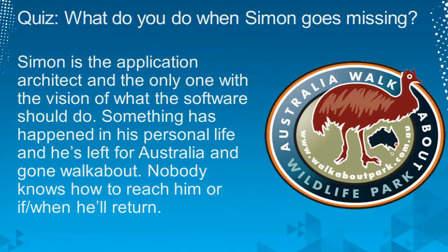Again, that's back to life. So you want to make sure you mitigate this as best you could. So having the vision shared, having someone else be product owner besides one of the team members, having a central product backlog so we all know what we have left to build, and we've got these stakeholders out here that can be looking at it as increments are delivered. That'll let us get to some kind of a vision.